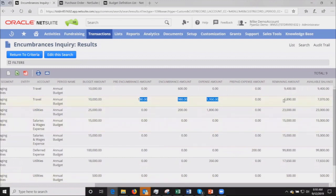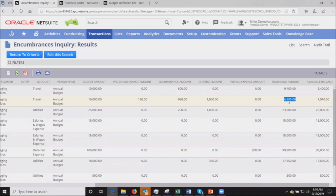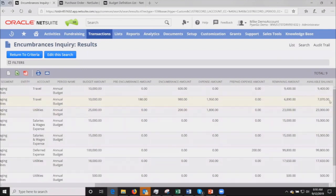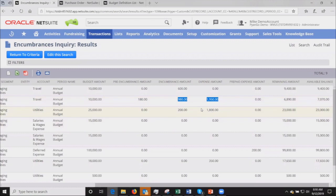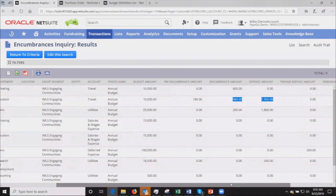Then we calculate our remaining amount and an available balance. The remaining amount is a pessimistic viewpoint of what's remaining because it includes this $180. The available balance is more of an optimistic view because it rejects these and just includes the $980 and the $1,950. If we were to reject our POs, any open POs, that would give us the available balance.